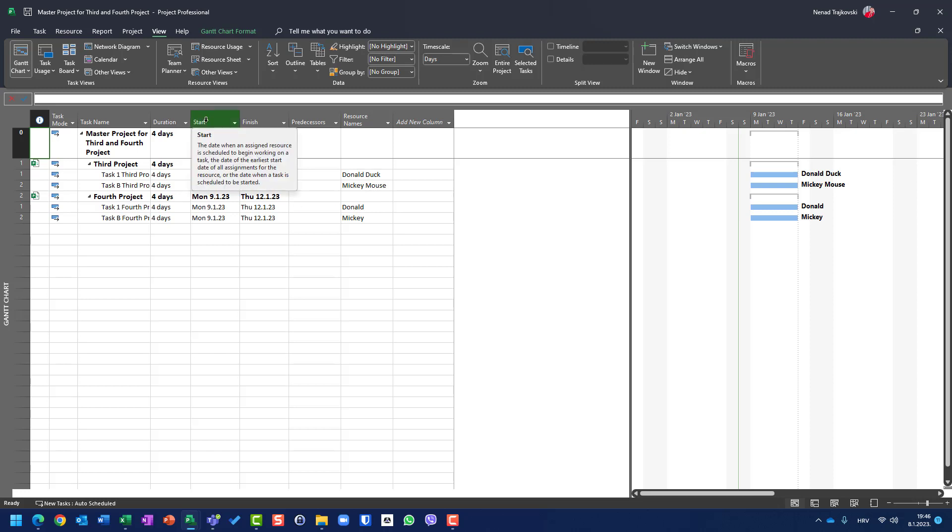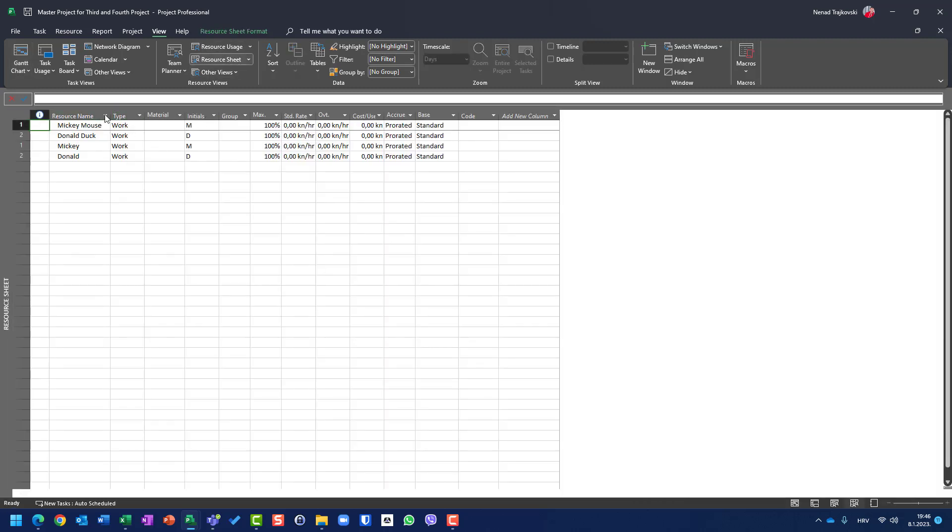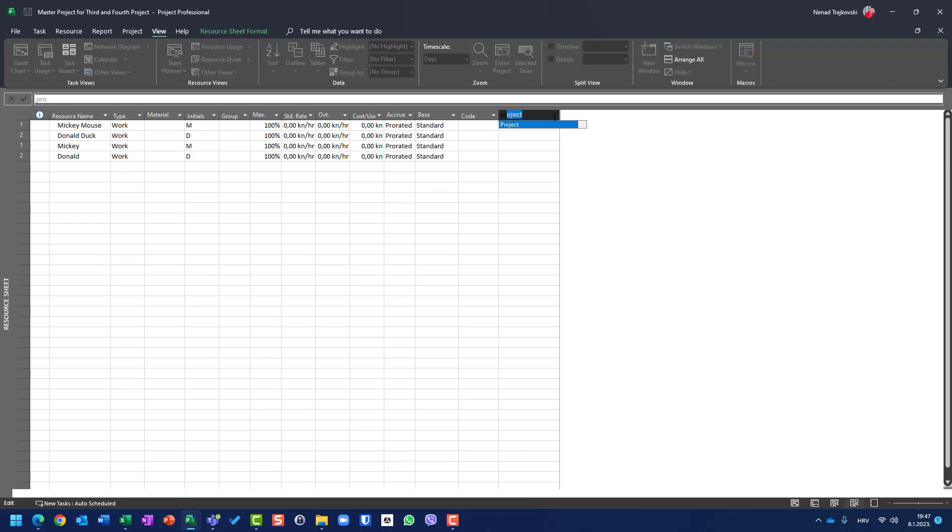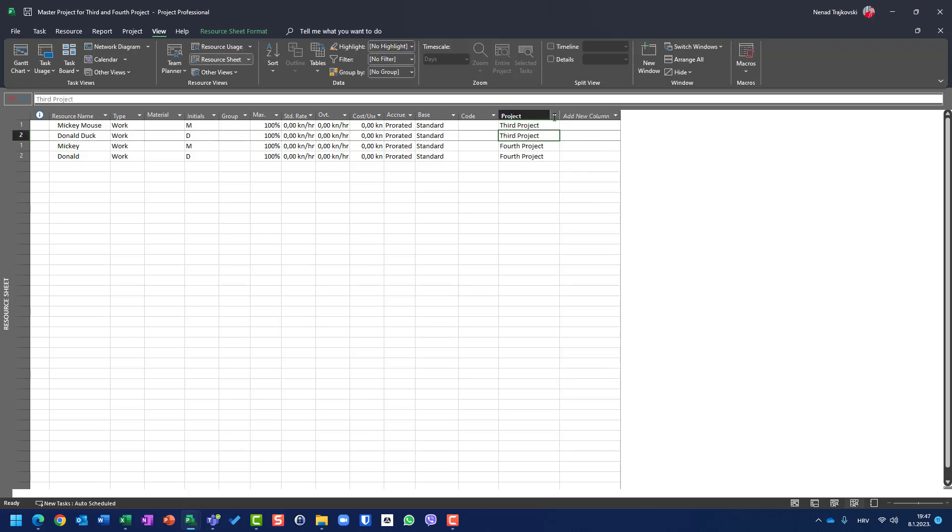Now be aware, when you have resources which have same names, it will be a little bit difficult because let's suppose you have 10 projects and each project has John as resource. They are considered as different resources, and it will be hard to tell which resource belongs to which project if you want to change a name. So use Project File when you have multiple resources on the master project. That is first advice.